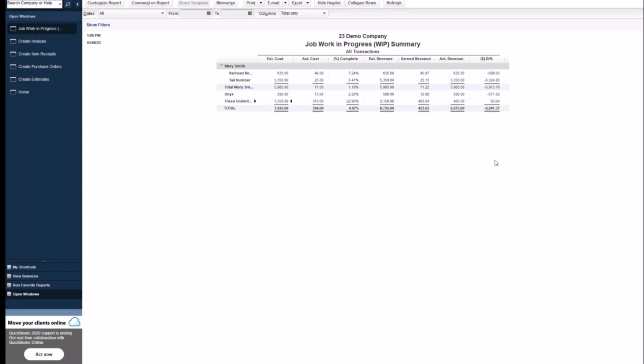Because if you think about it, as you go through this process every month, that number is going to change every month. So we don't want to be constantly adding to that balance, right? We want to be adding and taking away and balancing it out. So this difference right here, I'm going to say it again, is not going to be the actual entry amount. It's going to be the difference, because we want the balance in that balance sheet account to be this number.